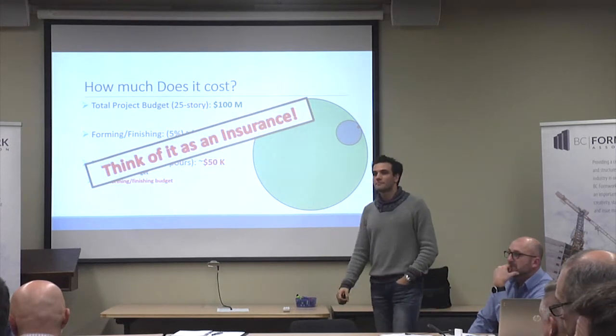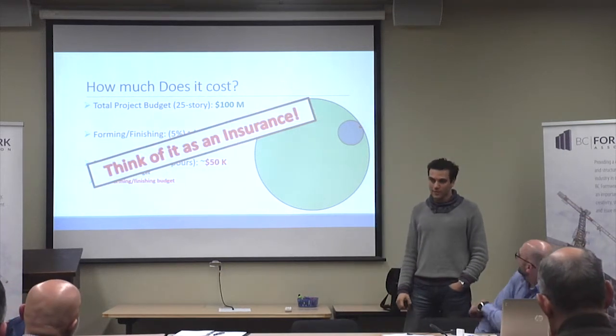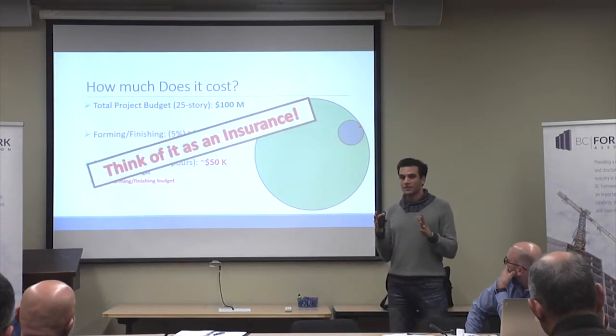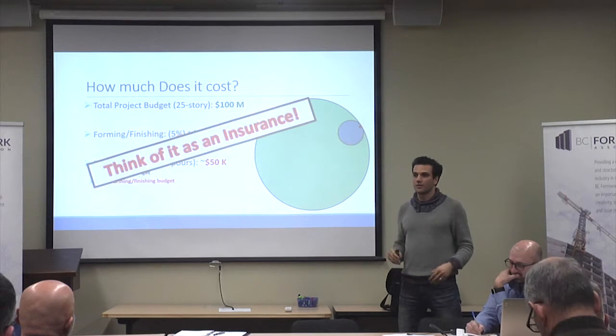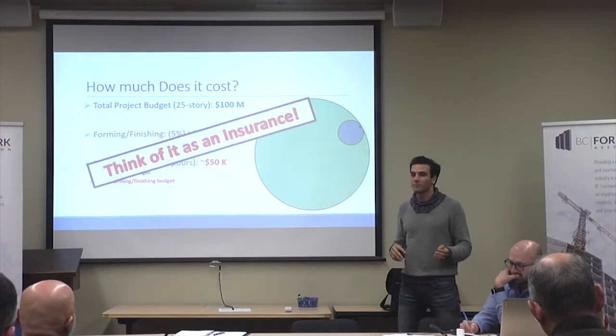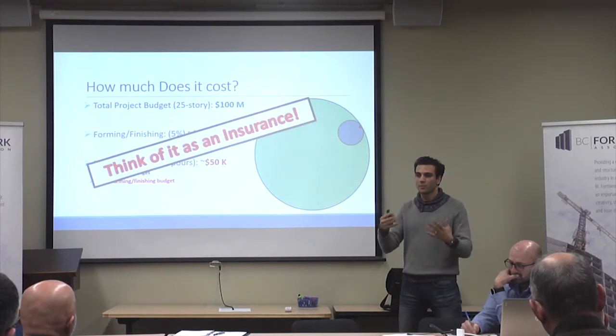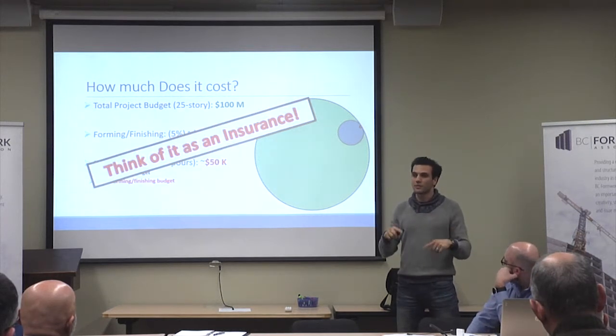Yes, sir. What percentage of your slabs pass? That was my question. That's a very good question. What usually happens is, let's say that you have a tower, and there are, I don't know how many pours happening. Usually the first 4 or 5 pours are going to fail. After that, if people realize that it's actually something important, they do a better job, and moving forward, it's going to pass.